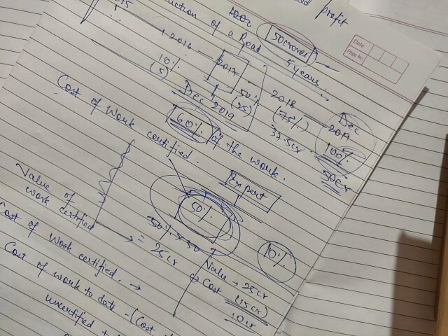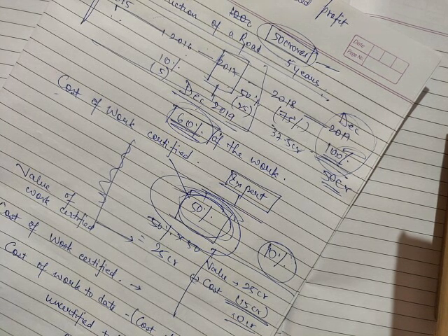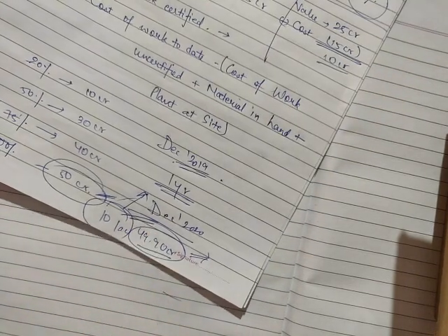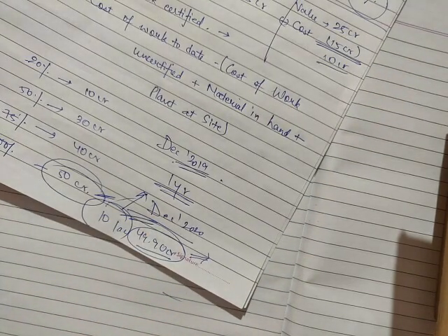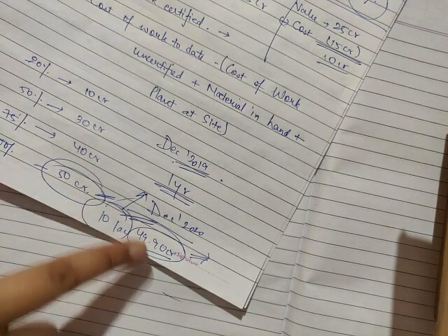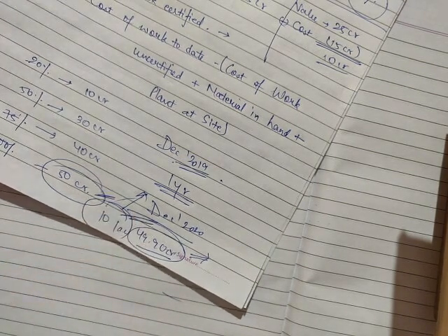Retention money is the amount that the contractee keeps to act as a cushion against any defect or undesirable work. Cash received is the amount that is finally received by the contractor. So say a retention money of 10 lakh is deducted due to certain delays and defects, then the contractor will get 49.9 crores, which is the actual cash received.